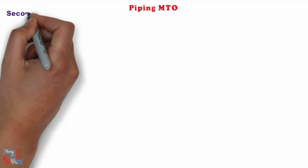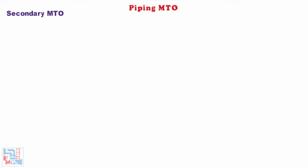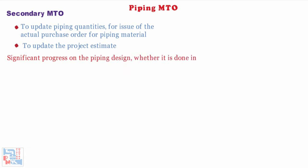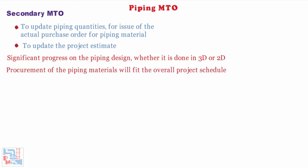Now comes secondary MTO. There are basically two reasons for doing a secondary piping MTO: first, to update piping quantities for issue of the actual purchase order for piping material; second, to update the project estimate. The secondary piping MTO is done when there is significant progress on the piping design, whether in 3D or 2D. It must be done early enough to ensure that procurement of piping materials fits the overall project schedule.